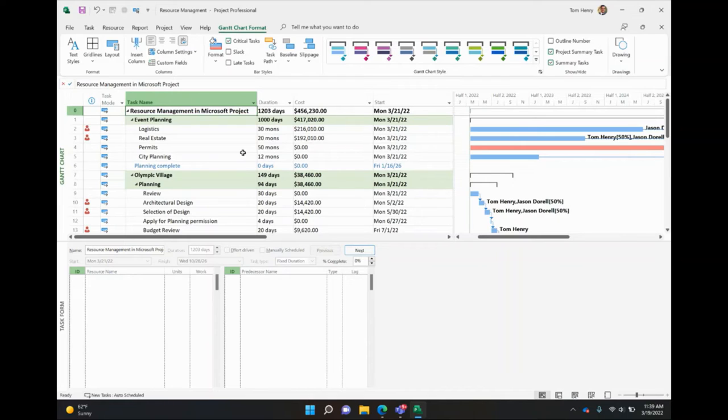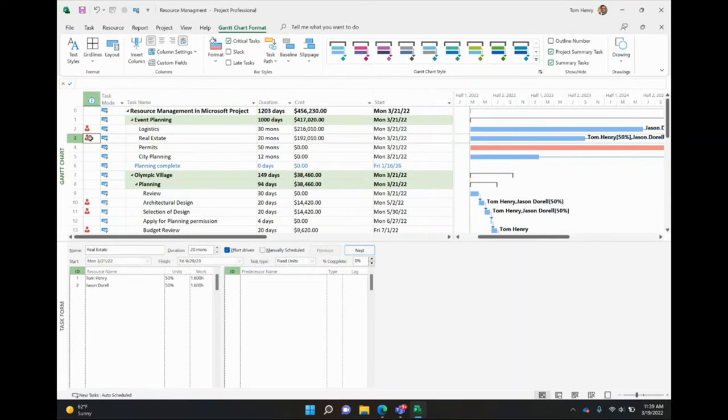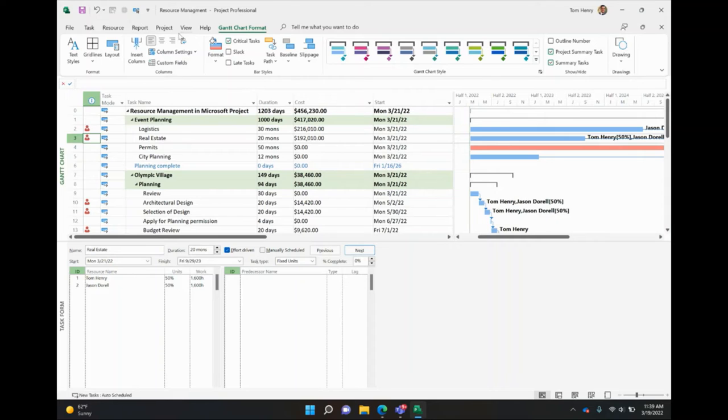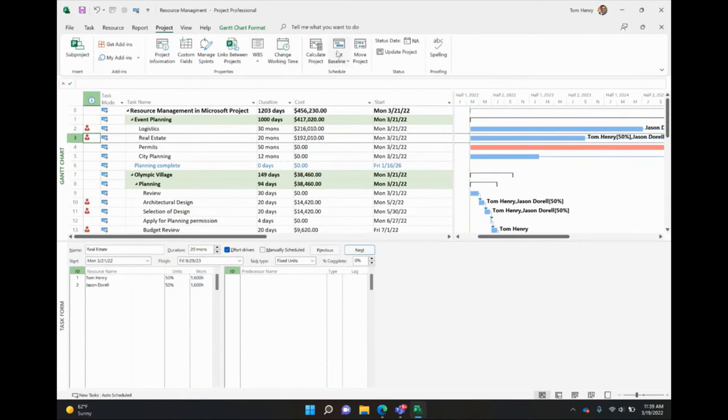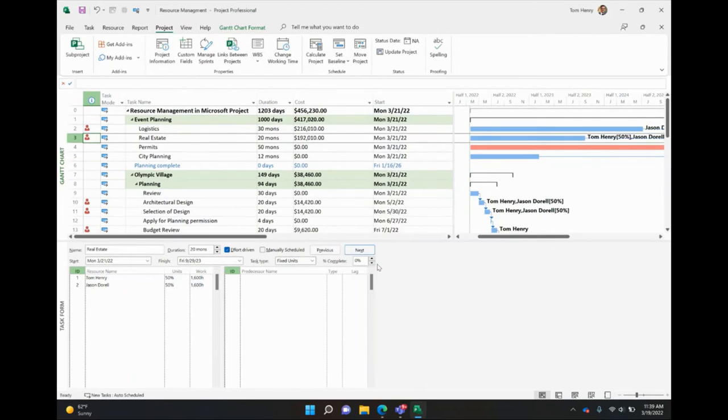So it goes to the planning phase up to the event planning and costs at the project summary task level, line zero. If you don't have that in your project, you can get it by coming on the format and checking project summary task to pull that in. You'd name that the name of your project. By default, it would be the name of your project up here. I actually changed that for the purposes of this video. So once you've assigned people, the first thing you want to do is, this is a very good plan of my project. I've got all my resources assigned. I've come in and leveled them so that we don't have any over allocation. I have another video that digs into that. I'll put a link at the end of this one if you want to see that. But let's go ahead and baseline our project. Set baseline, set baseline. Okay.